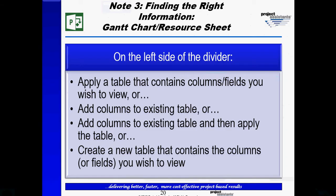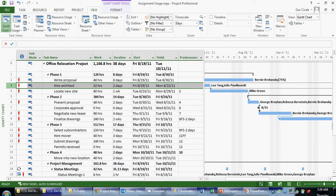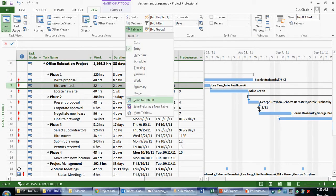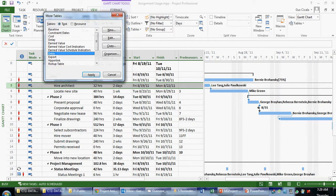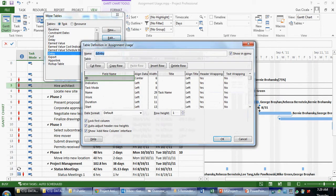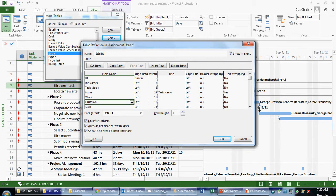The next note says, add columns to an existing table and then apply the table. And what that's really implying is you can edit the table and make multiple column updates while I'm editing the table. So whenever I choose tables, more tables, I'll have the option to edit the table. In this case, I can edit the table and I can insert other information.